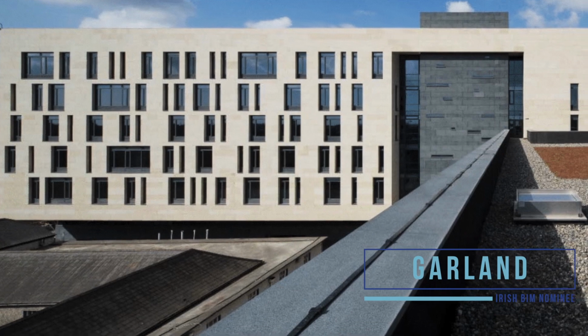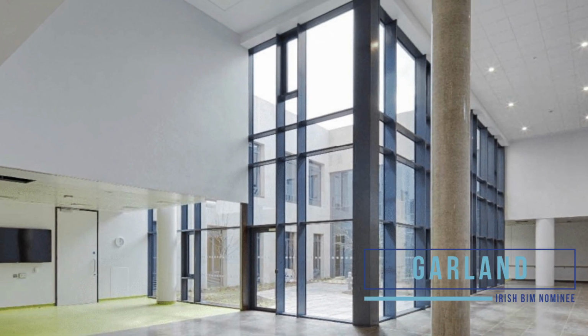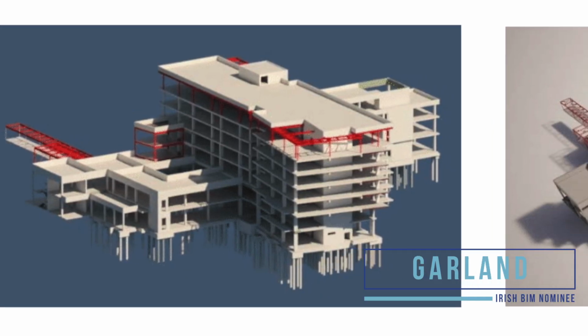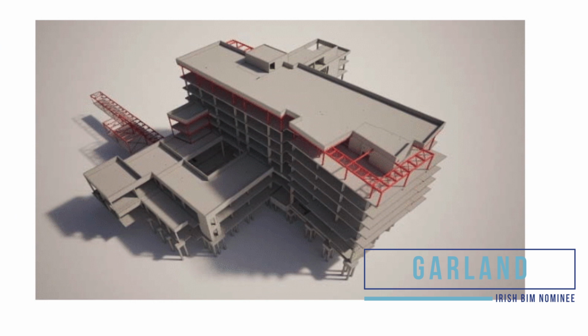It was a live healthcare project in an acute hospital, St James's Hospital. It was a restricted site and the building site wasn't the priority on the campus. It was secondary to what was going on and being delivered. As a result of that, visualisation tools, point cloud surveys, getting the building in the right place, interacting with the buildings in its surroundings was an essential part to deliver the project. Getting that information right at design stage was essential to delivering on site successfully without any issues.